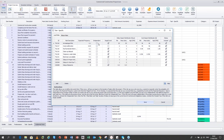For a single event with a 10% probability, if it occurs it will cause a delay of one to five days. Some risks have only cost impact, only delay impact, or both. To add a task-specific risk, you select it from the list for that particular task and it appears in the column. Multiple risk events can be assigned to the same task and can all occur in the same simulation sample.